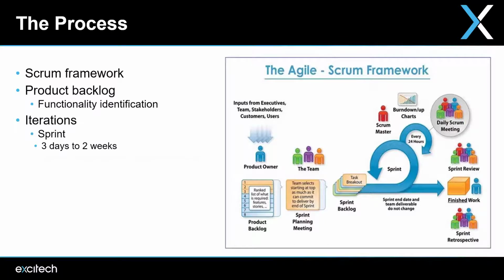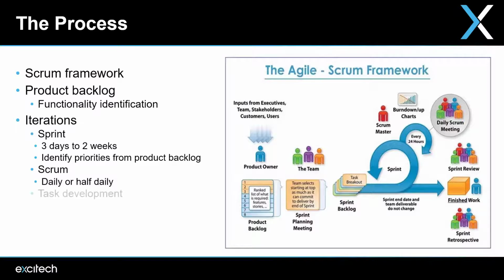In our application of Agile, our sprints could be from 3 days to 2 weeks, depending on the type of automation project in hand. Where possible, a short opening sprint will be used to develop some form of minimal viable product to give an immediate return and secure confidence for future investment.